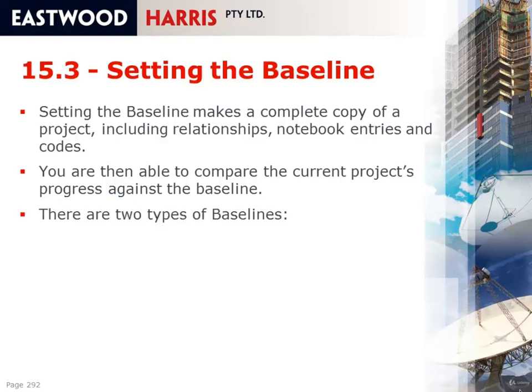I consider two types of baselines when I look at baselines. First of all, there is what I'll call a management or contract baseline. So this would be a copy of the original project when you sign a contract, or if you're executing an in-house project, it's the agreed schedule that the project will be managed by as the project progresses. And in the case of a contract baseline, this will be the baseline that extensions of time and variations and scope changes or acceleration may be calculated against.